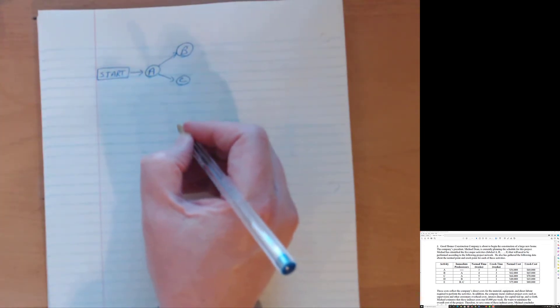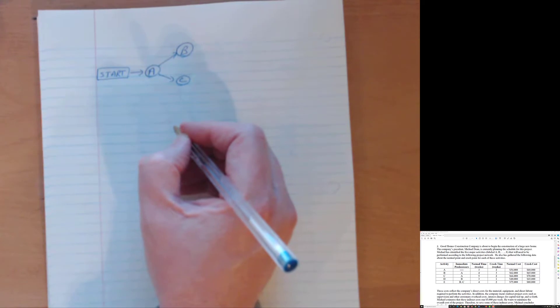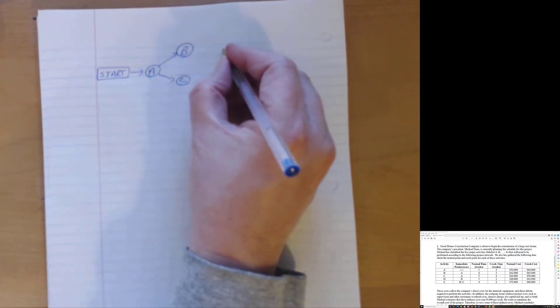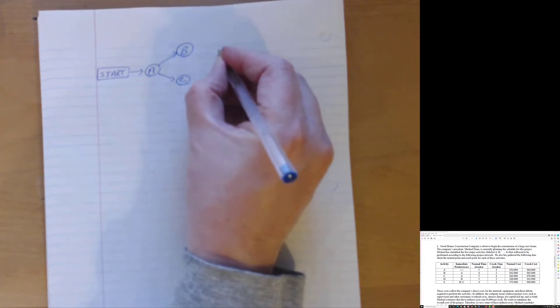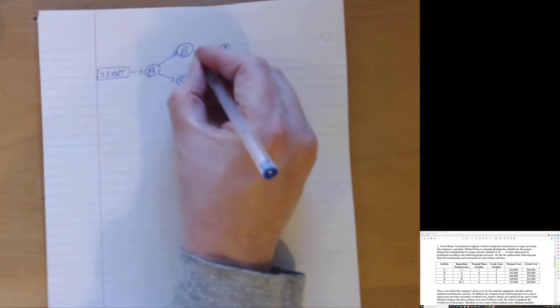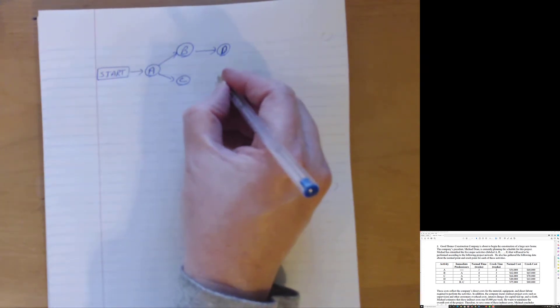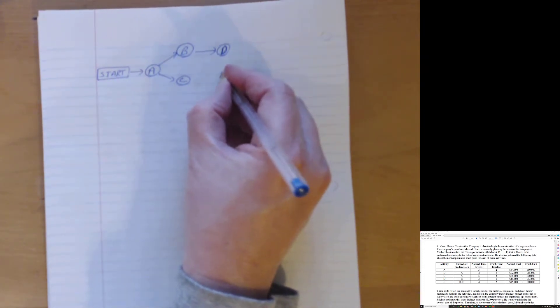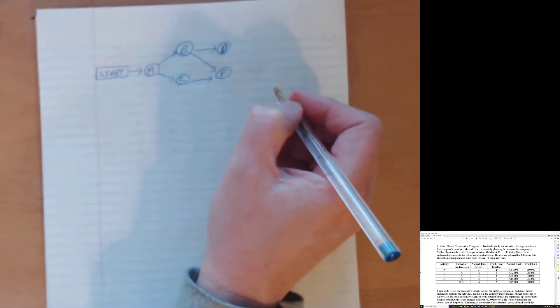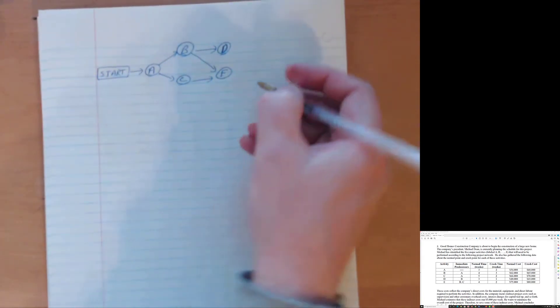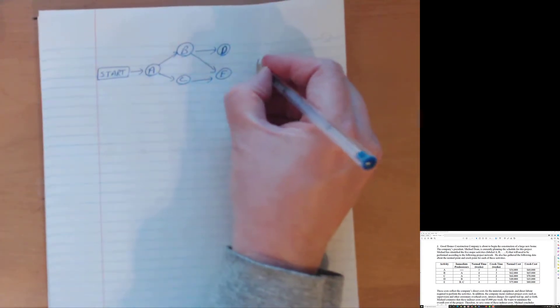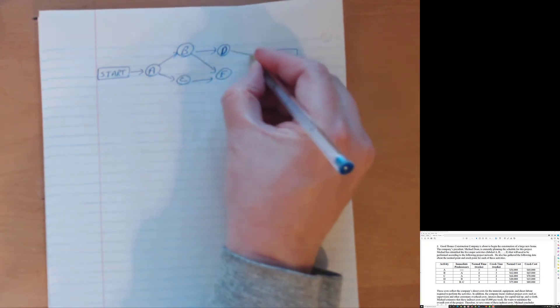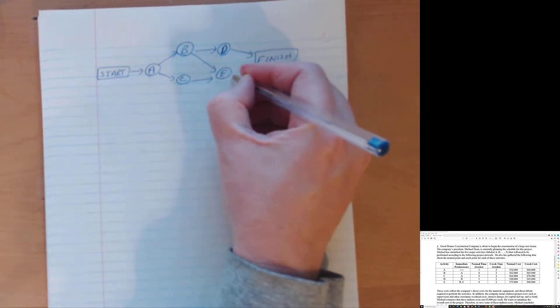D as in Delta has only one immediate predecessor and that would be activity B as in Bravo. So D depends only on B. Activity E, however, if I draw out an activity E, that activity is dependent on both B and activity C. Those are the only five activities. So now we just kind of go to finish. D and E are end nodes and so they directly link to finish.